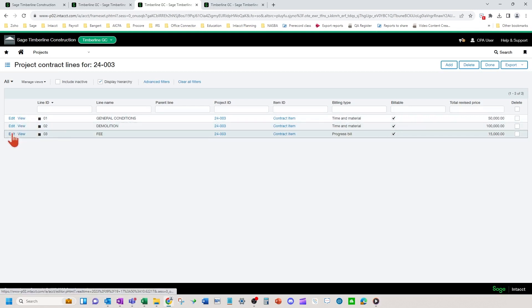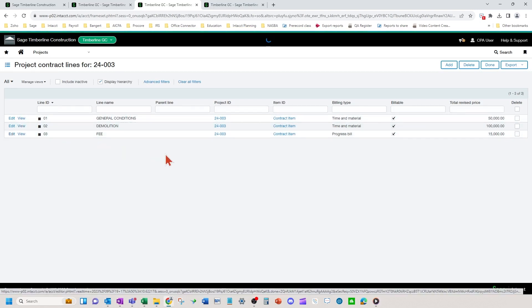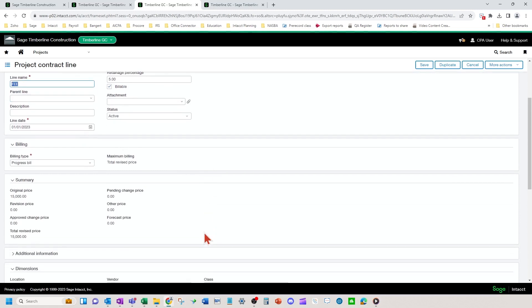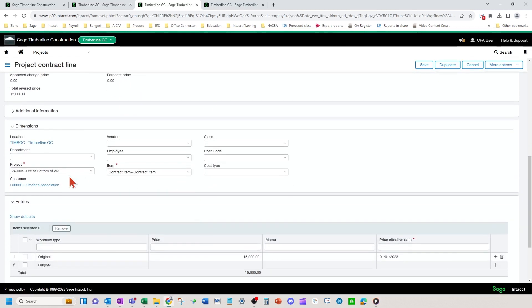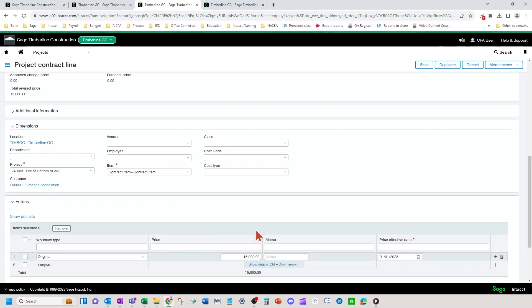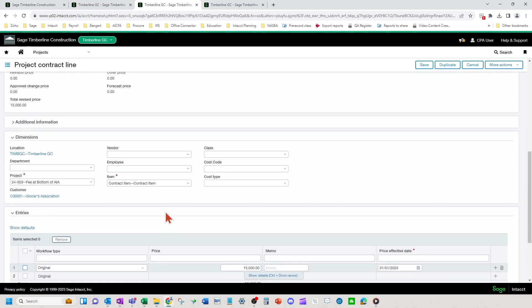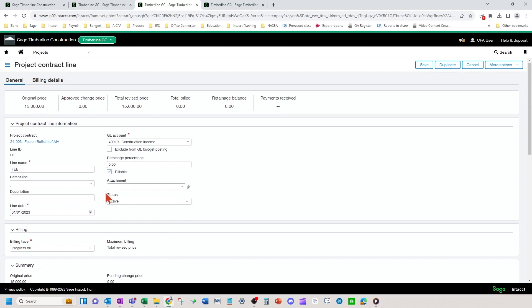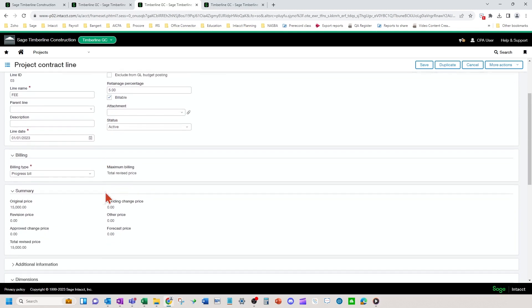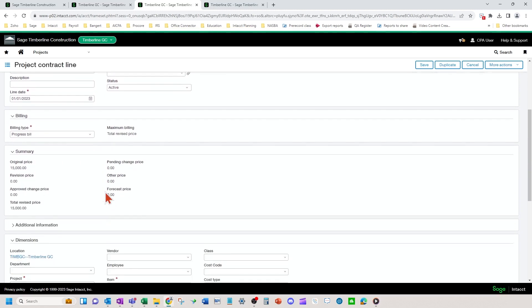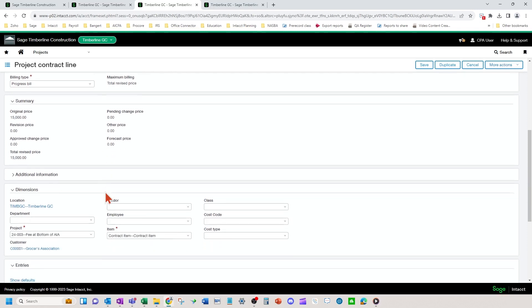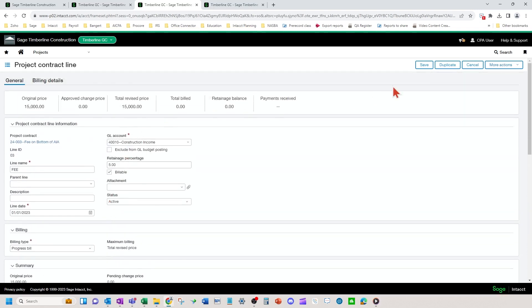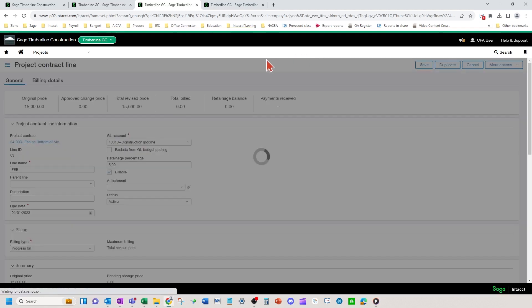So we're going to put the fee at the bottom here and we're going to call it a progress bill billing type. Got everything else the same. You could put a schedule of values line amount in there if you want. The caveat to this is that the fee does not automatically calculate. You type the fee in. So if you want the fee segregated out from your costs at the bottom of the AIA, you will need to type that in on the next step in the next screen when you generate invoices.